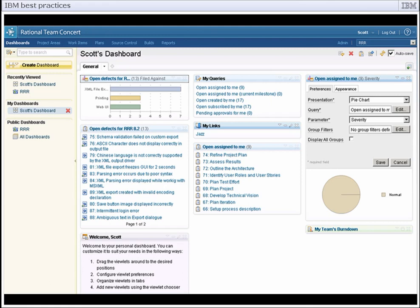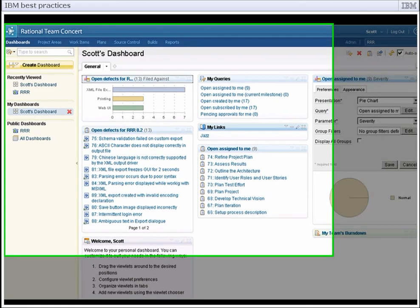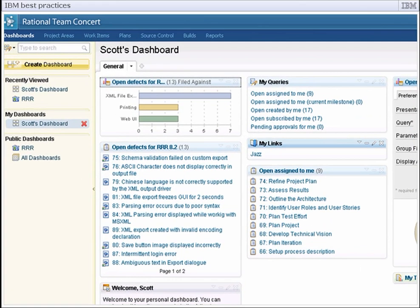To determine what's wrong, the development manager for RRR 8.2 reviews the work items in Rational Team Concert and notices that a high percentage of the defects are filed against an import feature that was added in a prior release. Since very few changes have been made to that code, we decide that many of the defects in the latest version of RRR were opened against code that was implemented in a previous release.